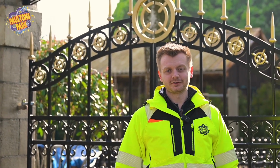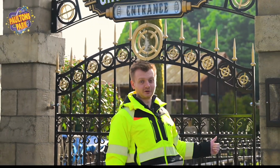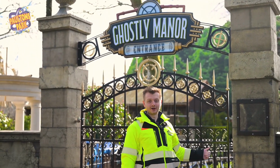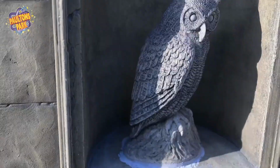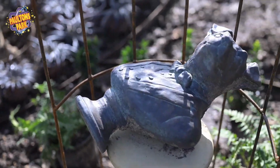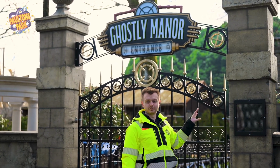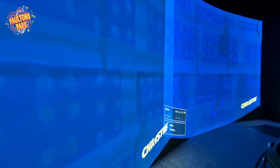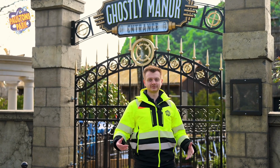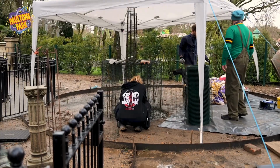Thank you for watching this update video on the construction of Ghostly Manor. As you can see, it's really coming along and we're reaching the end of the project now, but there's still quite a lot to do. Obviously the gardening team will be out here doing the landscaping and planting all the plants, and inside the ride is going to be the start of the commissioning process for our teams. So Lagatronics and Mac will begin the handover to our engineering and our park operations team, and they'll start writing procedures and testing the ride and ensuring that the ride is operated as efficiently and as safely as possible.